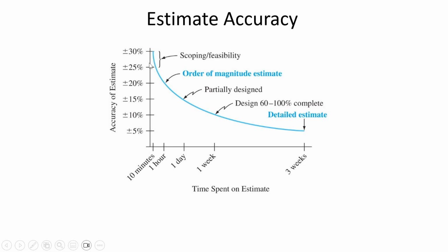So like this building, if you had 10 minutes to estimate how much they paid to build this building, you might just, first of all, add up the square footage and then try and get some data on the cost per square foot of building an academic building. That's maybe all you could do in 10 minutes. And if you did that, it would be okay, but it wouldn't be accurate as if you had said, well, I'm not just going to go by square foot for the building.